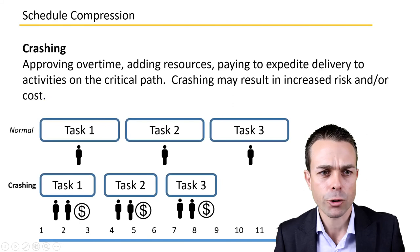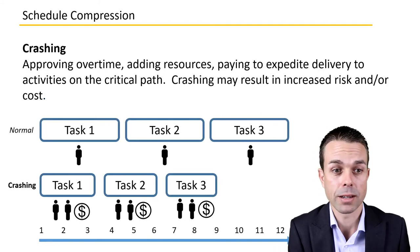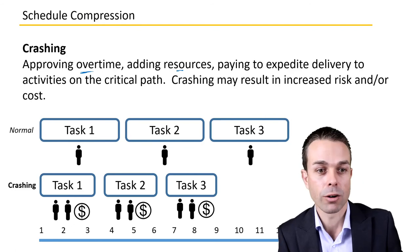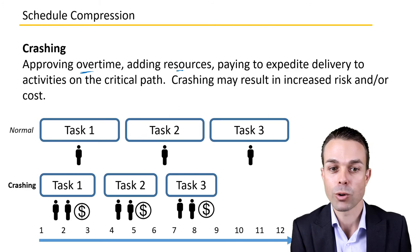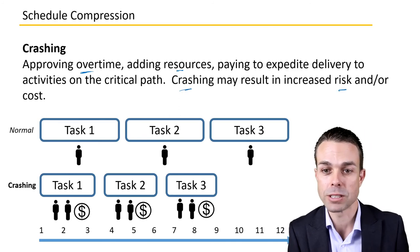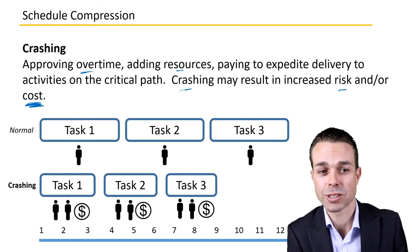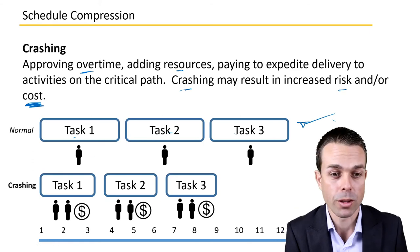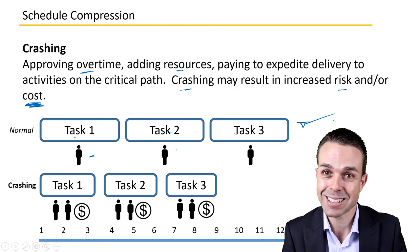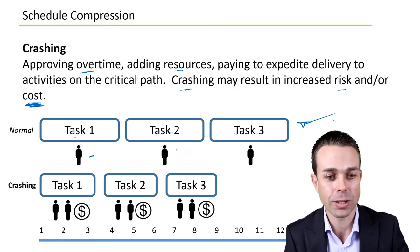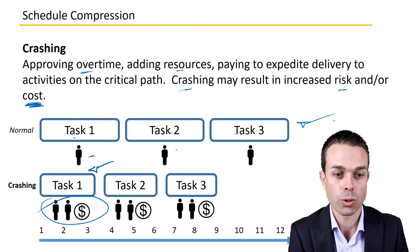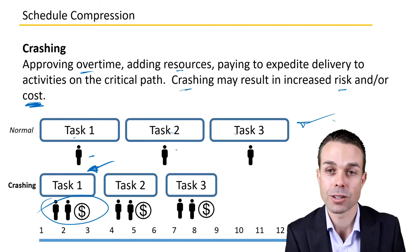Let's look at a few examples. Crashing might involve approving overtime, adding resources, or paying to expedite the delivery of activities on the critical path. Because of that, crashing may result in increased risk and certainly increased cost. As an example, at the top here we've got task one, task two, task three as our normal schedule with just one person assigned to each. But if we're crashing this project schedule, we're adding resources, and now we're able to shorten the time of those tasks.